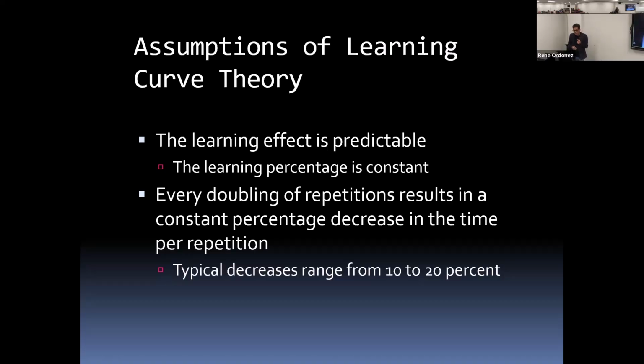That also, the learning effect is predictable. And I've done some experiments on this years ago with my undergrad students. I'd bring a box of Lego toys with probably, say, 200 pieces. And then I would ask them to assemble, disassemble, and reassemble the toy X number of times. So they were experimenting, taking a sample so that you can understand the learning effect. And we've observed that there is a predictable pattern of improving the completion time of each succeeding unit. All right.